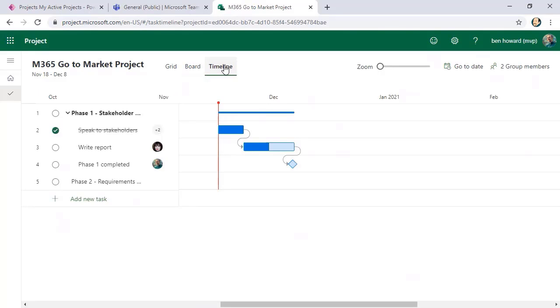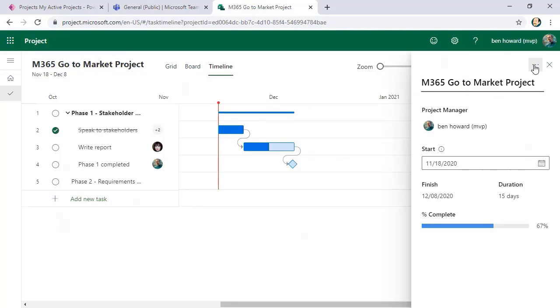this is our Power BI. That's Power BI. This is our Project Online, and we can just build this up. A couple of other things we can do is, if I want to, obviously I can delete it once we've finished with it. I can also copy it. So this is the nearest we get at the moment to creating a template. I could set up a standard dummy project if you like, and then copy that and create my new projects from that. Okay, let's go